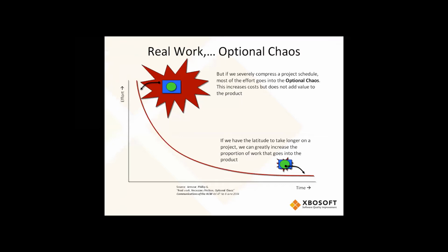So if we go to 20 headcount from 10 to try to compress schedule on a project that's, say, a 10-month schedule, and the boss says, I want it done in 6, double the headcount, we actually can't compress it to 6. The most we tend to see is about a 20% compression. We'll shrink 10 months to 8 months, but we'll drive defects up by a factor of 4, if not 5, if not 6. And that's something that we see quite often in the data. It's called the inverse fourth power trade-off law. It's actually published in all of our books.